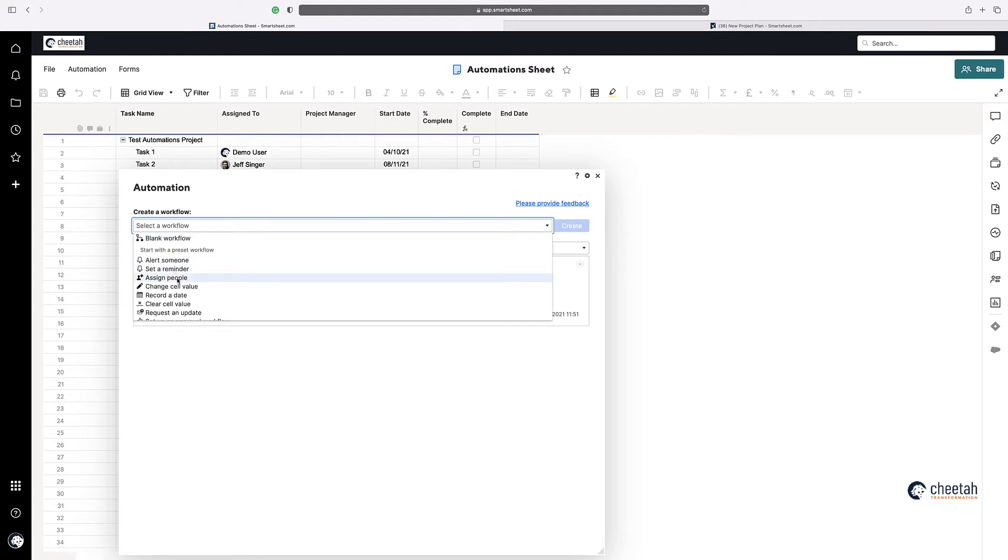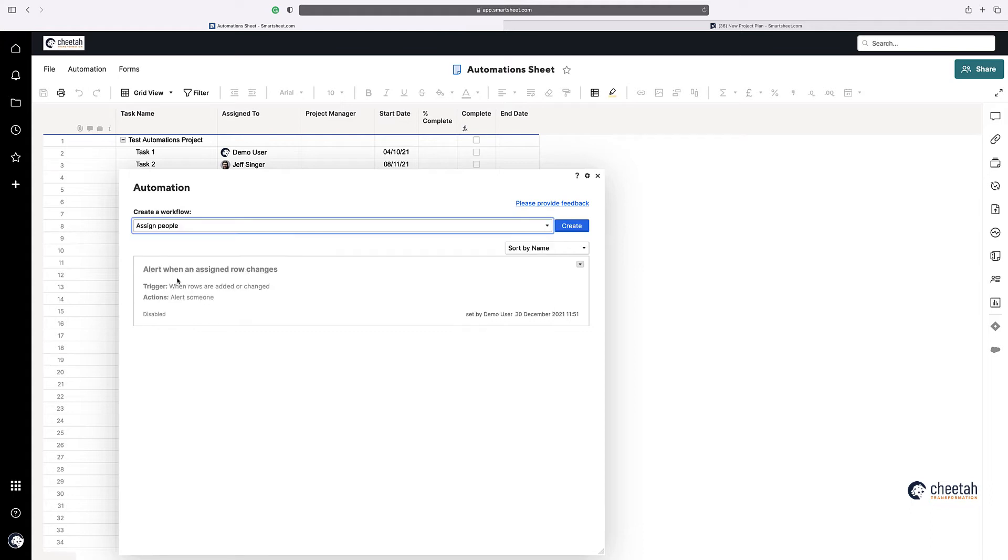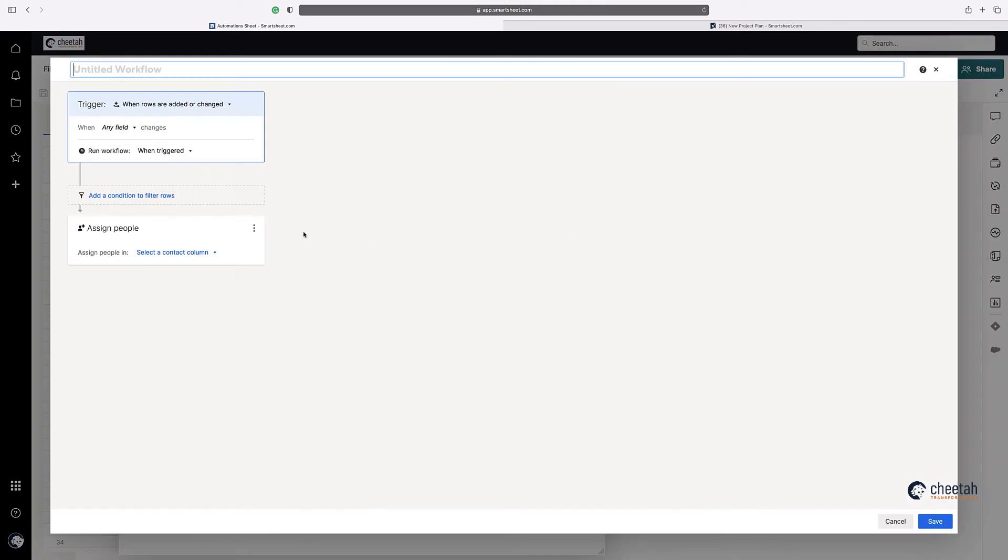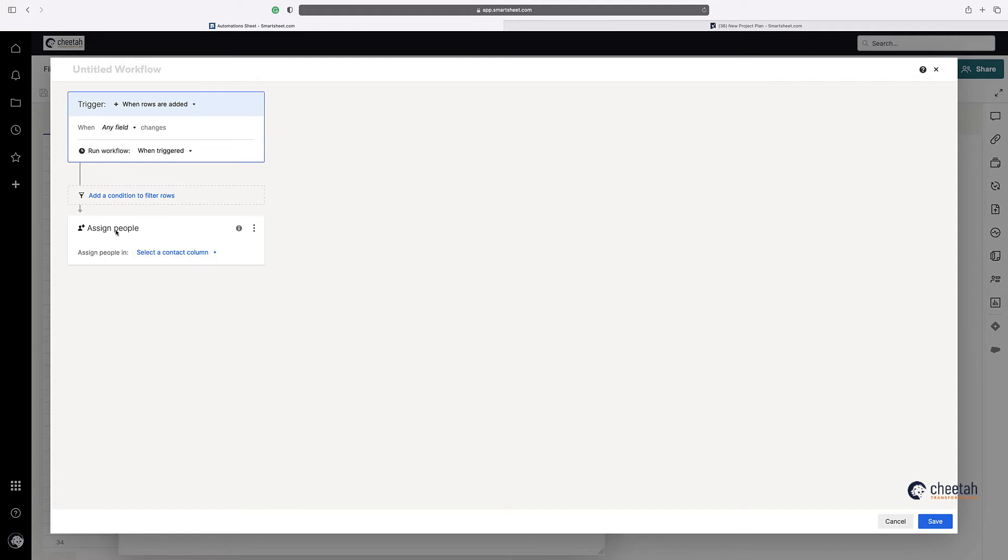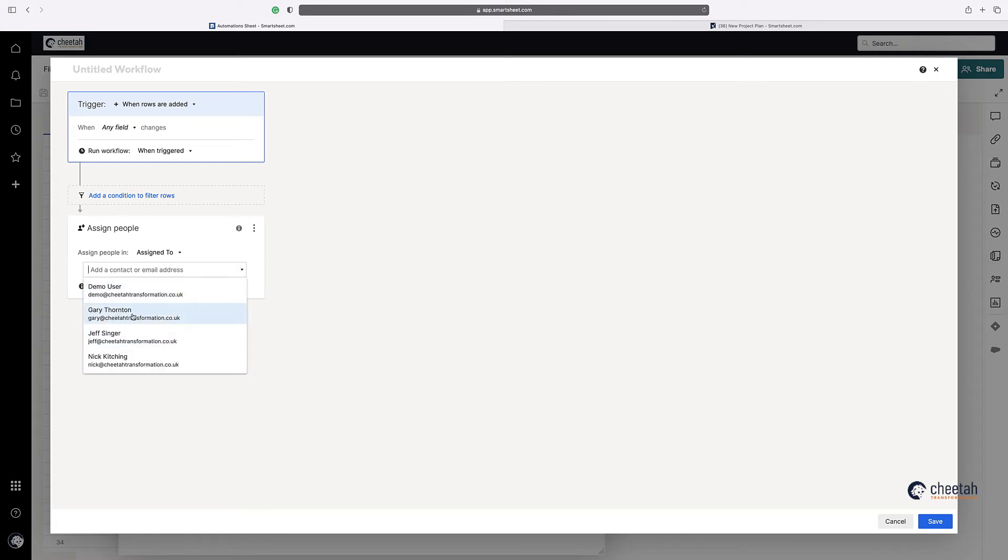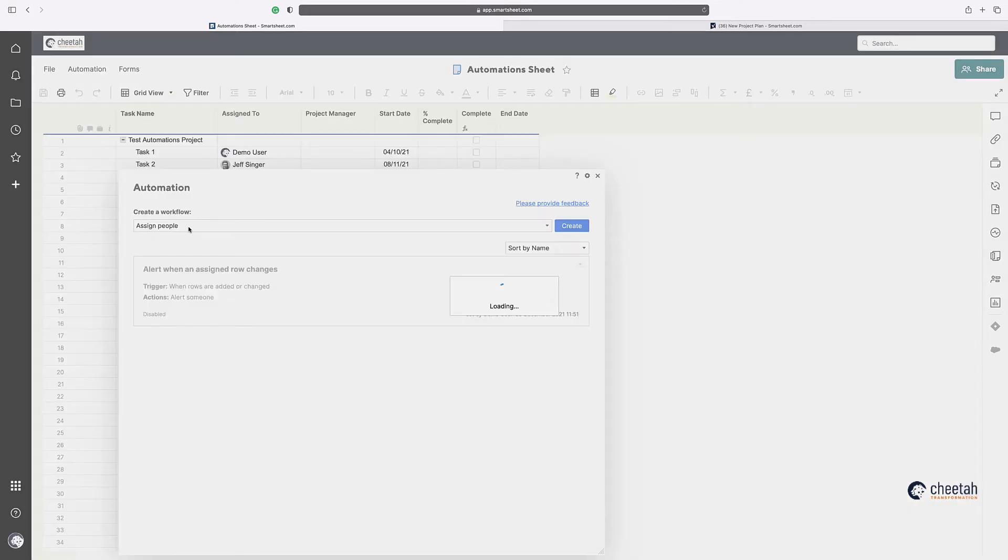Okay, so just going to cover off some of the other workflows just briefly. I will be doing separate videos on each of these in more detail, so watch out for those in the coming weeks. But we just covered the alert someone, set a reminder, it works exactly the same. So you can actually, if I've got a start date here, I can alert someone that there's an item starting, or if I've got an end date here, as you've got here, you can say seven days before. Or if it's not complete, then obviously set a reminder for someone. The next one is around assigning people to tasks.